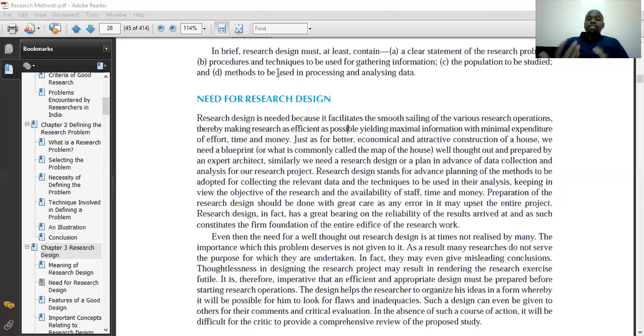So you're able to readjust and say, okay, day 4 was for data collection through interviews, we are going to put that on day 5, and then all other activities follow. So if your research was ending on day 10, then it will end on day 11 because one day has been inconvenienced.